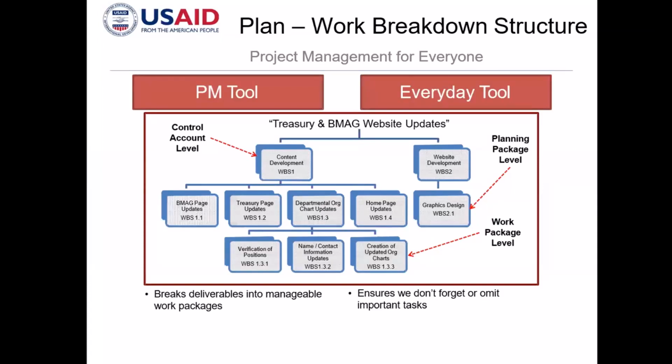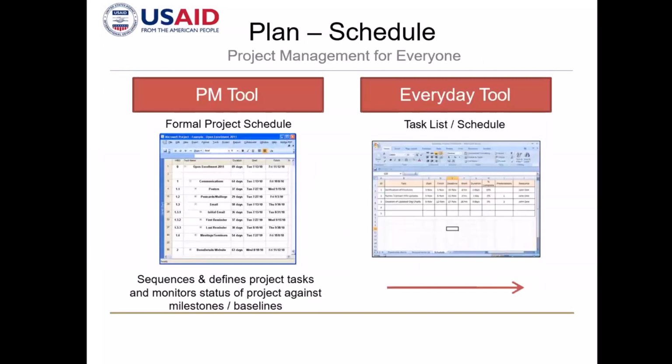As you can see here, the project here is a website. So each major activity is defined as a work breakdown structure up to the subtask. So once you have defined all the tasks or you have completed your work breakdown structure, you are now ready to come up with your formal project schedule or your final project schedule.